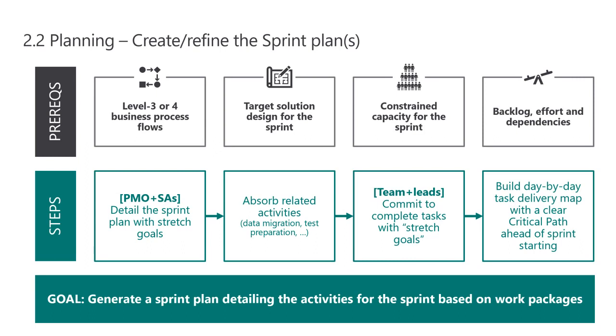What we recommend is, instead of just doing the plan for the sprint that's coming, do the plan for the next 2 or 3 sprints. Clearly, the next sprint coming will be the most detailed, the most well understood. Have a plan for sprint 2 and sprint 3 as well. And before you finish sprint 1, you've got a better definition of sprint 2, sprint 3, and sprint 4. In other words, a roll forward sprint plan, right? You've already got a macro plan for each of these sprints. These sprint plans are much more detailed.